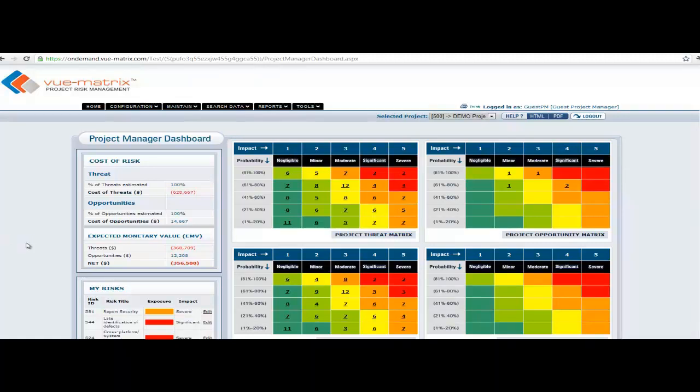In this clip, we will see how we can mass import risks at one time. Instead of going into the form and entering risks one after the other, which is quite time consuming, honestly speaking, it's actually a lot easier for us to just take a bulk of 100 risks at a time, get an Excel spreadsheet circulated among your team members, asynchronously get those inputs in, and then you have a final spreadsheet that you can just import. That way 100 or 200 risks go in at a time and everything is there. So I'm going to show you that pretty quickly here.